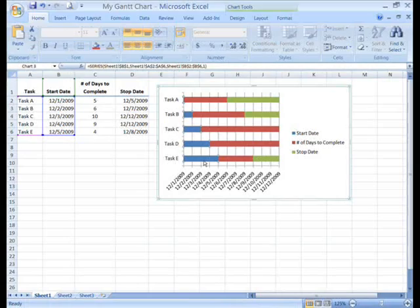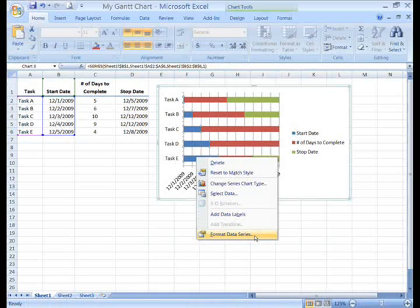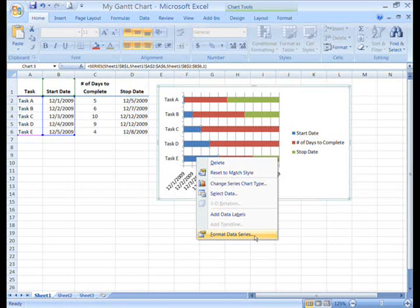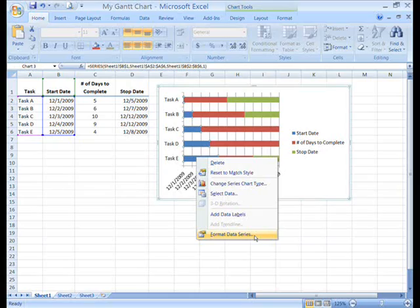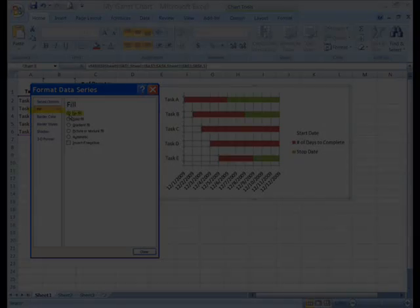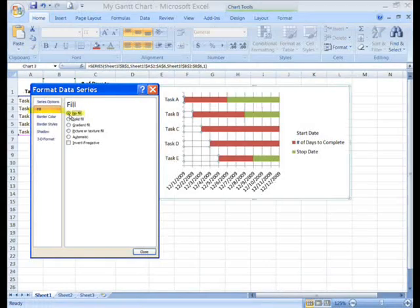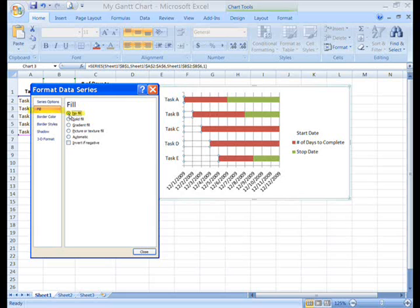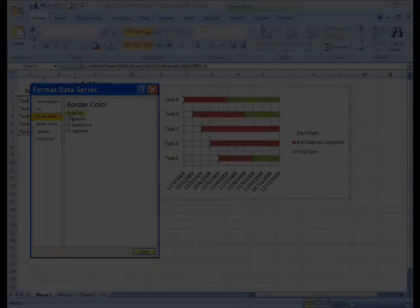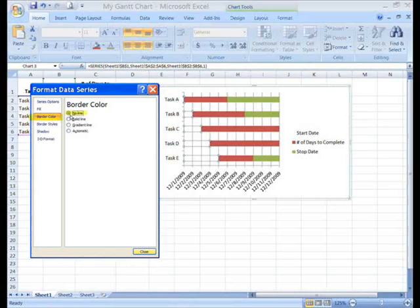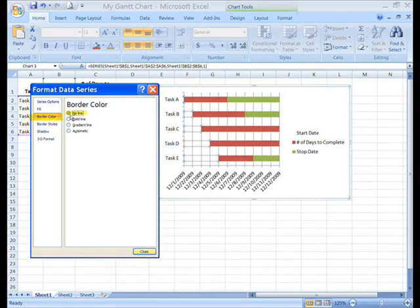For this chart, we want to display only the middle part of the bars. We'll hide the parts we don't need. Click on the left side of any one of the bars, which selects them all. Now right click on them to open the format menu, then click on format data series. On the left side of the dialog box, click on fill. Then on the right, under fill, click in the tiny circle next to no fill. On the left side of the dialog box, click border color, and then on the right, click inside the circle next to no line. Click the close button.